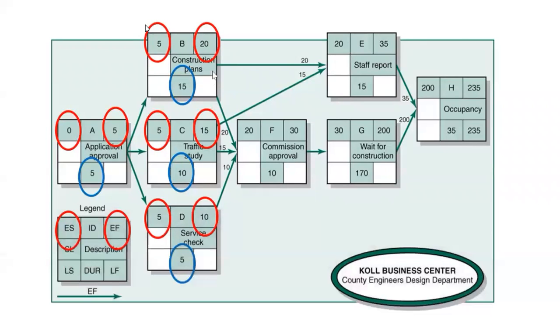It's giving us these different time frames for our earliest finish days on these activities. Now, as we go forward, we need to take across the largest number. So if we have a look here at E, there's a choice between 20 or 15. And for F, we have a choice of 20, 15, or 10. We have to take the largest number because everything has not been completed yet in terms of taking across a smaller number. So if we take across 20, we can be sure that all these different activities have been done.